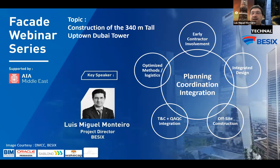WakeCap is another digital tool, a geolocation tool, which allows us to know at any given moment where every single stakeholder and worker is on site, allowing us to have crowd monitoring in order to understand if we have above a certain number of people in a certain designated space. We are using it right now for the COVID-19 proximity cases in order to trace and to avoid crowds in certain areas